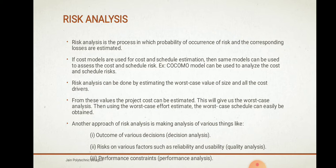In risk analysis, the process involves estimating the probability of occurrence of a risk and the corresponding loss. Once we have identified a risk, we calculate how much it is going to affect the project — that is, how much loss it will cause. If cost models are used for cost and schedule estimation, we can use the same model. For example, the COCOMO model can be used to analyze cost and schedule risk by estimating the worst-case value of size and all the cost drivers.